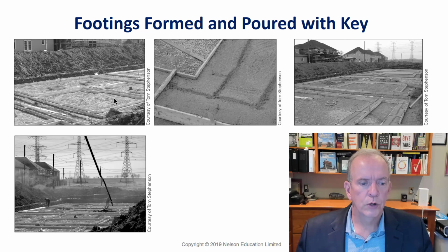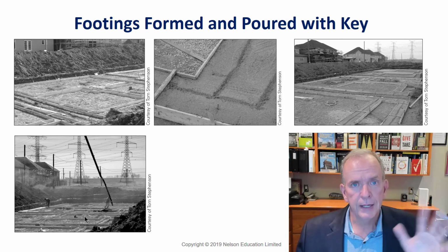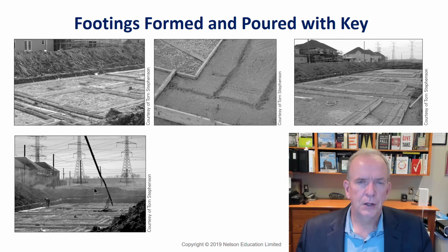And so everything is formed up, and then because, in this case, you're doing production homes. Remember I said 140 days? That's not a bad number for production, for probably around a 2,000 square foot house. You have production, you can do a whole bunch of footings all at once. If you're doing a custom home, it's going to take a lot longer than 140 days.